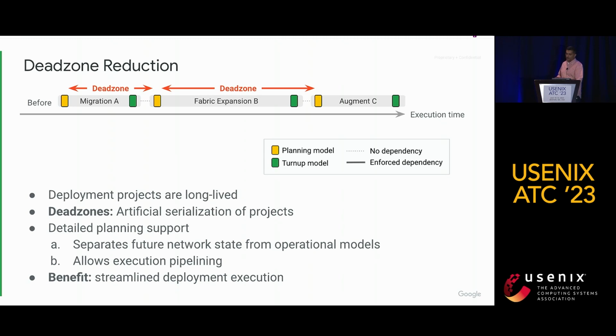Our old network modeling system didn't support planning and effectively had a maximum stack depth of 1. In reality, some of the prep work for Project B should not be blocked on A's completion, especially things with long lead times like material orders. In essence, if you have a committed execution sequence, you should be able to front load most of the prep work.